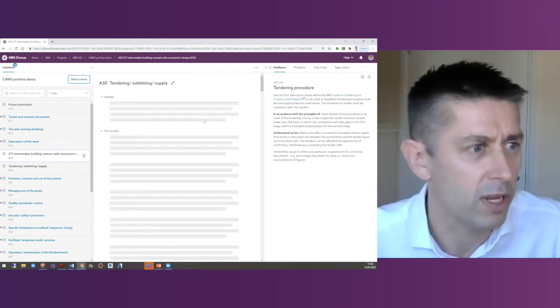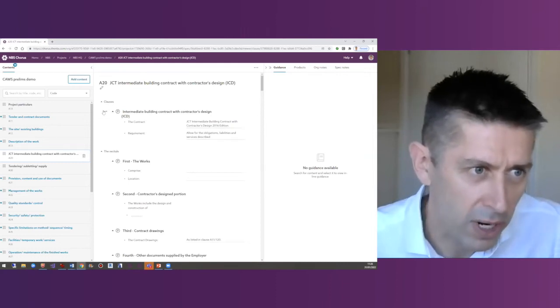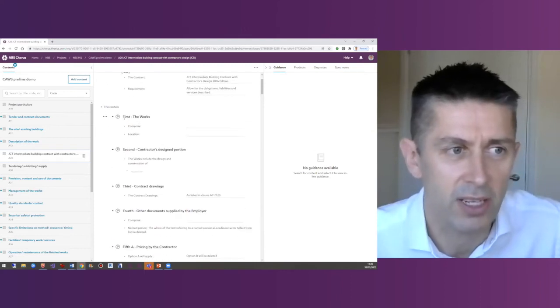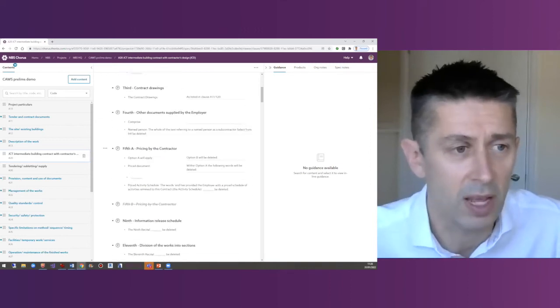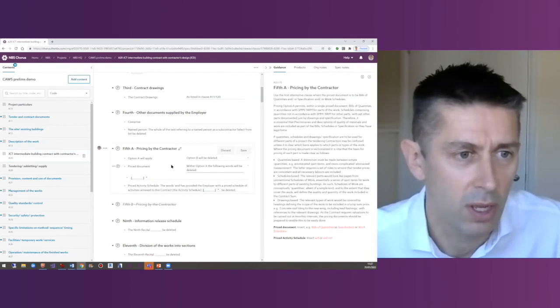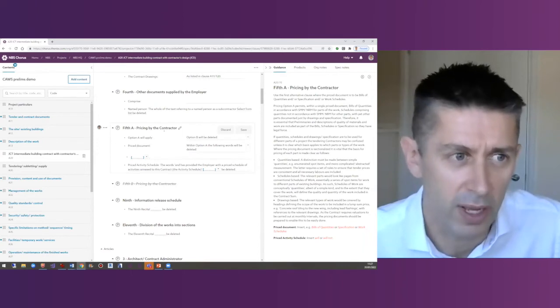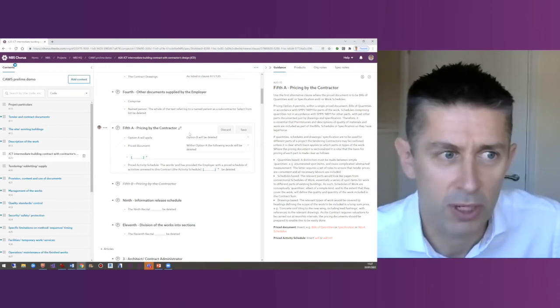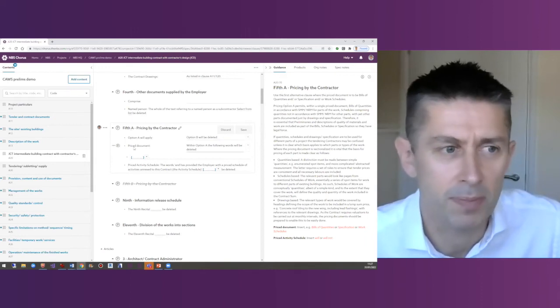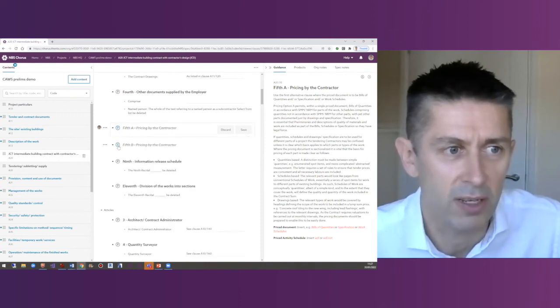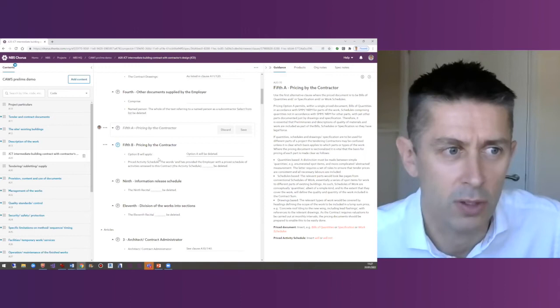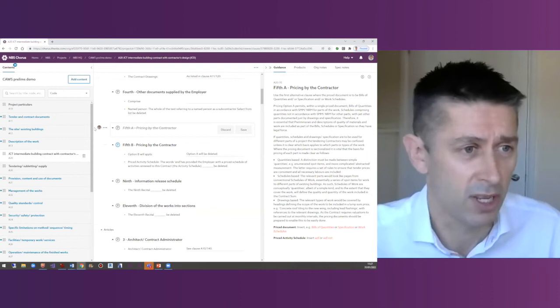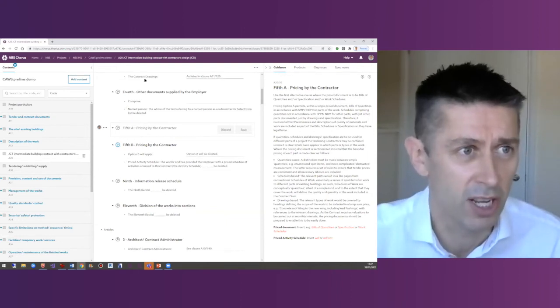If we just have a little glance here at the A20 section, you'll see subtle differences. The main sections from NBS are all numbered with NBS clause numbers for you to cross-reference. The A20s are numbered by the equivalent clause numbers in the building contract. If you look at A20 here, it's just loading on the screen, you don't have those numbers like 110, 120, 130, but in the titles themselves, it'll say things like the first recital, second recital, third, which is the language used in that particular building contract that you're writing the prelims for. It's worth just mentioning this clause - sometimes you'll have an alternative clause where the first clause is in the job, but when you read the guidance, you see there's two options here. You can go for the A or the B option, and you can always cross out this if this one's not right, and pull in the alternative clause as well. So, demonstrating there how you can quickly pull together that set of prelims, and then edit it to make it right for your project.